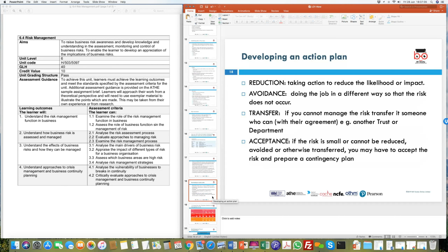So I'll go into action. So we've identified, we've assessed the risks using some sort of a template risk assessment policy, which is there in different organizations, and that could be very specific to an organization. And when we look at that, what we're looking at now is that we know they have been identified, we know what kind of problems or issues, say whether it's financial, reputational, safety related, what they can cause. Then we have to develop some sort of a plan to mitigate or reduce those risks. And in most cases, we follow a reduction, avoidance, transfer, acceptance kind of approach.